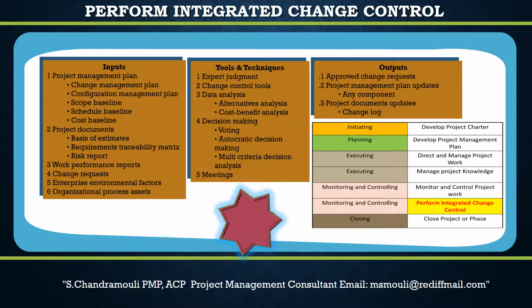It includes a group responsible for approving or rejecting proposed changes. Defined classes of changes can sometimes be automatically approved. All changes must be documented. Changes change the project baselines.